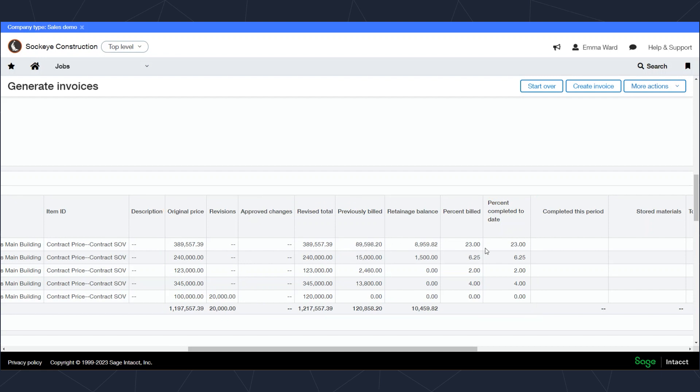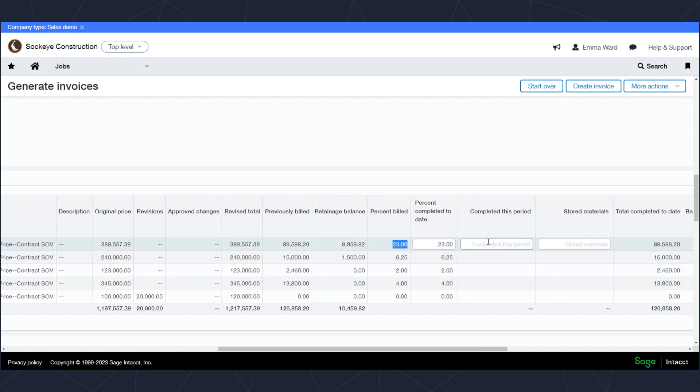Now, as we click on an individual line here, I can see previously what was billed on here was 23%. So if I keep it at 23%, it's not going to bill anything extra on that contract line. However, if I say today we are at 30% of that line, it will indicate and calculate the additional 7% that needs to be billed on that line. I can either do that by percentage or by dollar amount. Again, up to you.